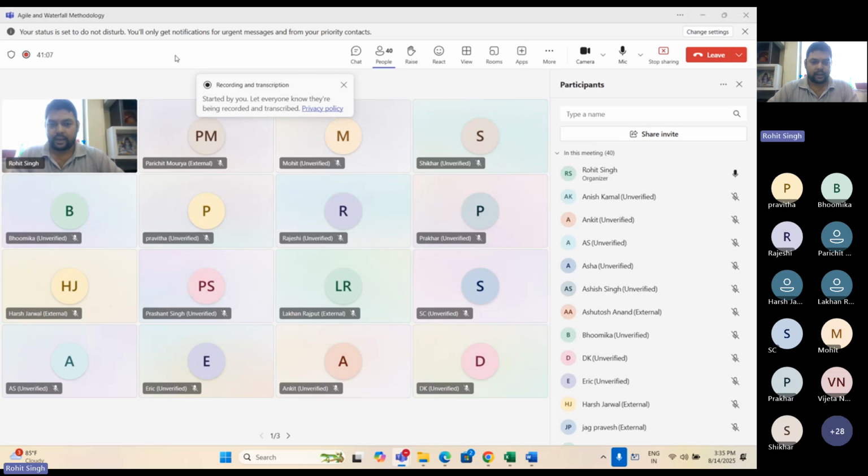I want to embed Excel sheet. I want to embed MS Office so that I can use it during presentations. I want to embed more AI-based transcriptions so that whoever is asking the question, the answer would be automatically available to me. So these are the changes. If there are changes, there will be a time delay. If there are changes, there will be a change in the budget.